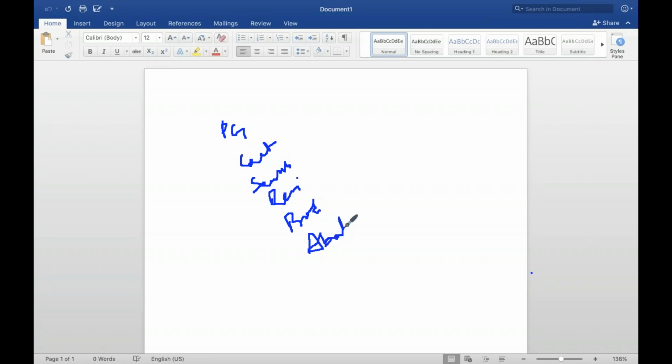They list out the requirements and they give labels like this: small, smaller, medium, large, largest. You can use whatever labels you want. Now they use stickies. Normally in the office, you have small stickies with gum on the top that you can stick to the wall. So let us say this is payment gateway. They write this requirement here. Where do you put payment gateway? Small, smaller, medium, large, largest. Can anyone tell under what category payment gateway can fall?